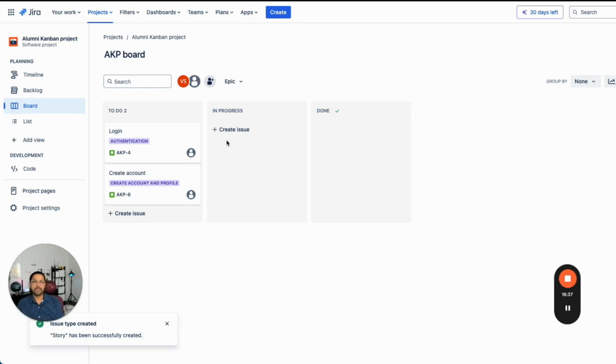We typically try to bring so much work and think that we can work simultaneously on many things, but in reality, if you pick something, you take it to the finish line, you get the momentum, you pick the second item, take it to the finish line, and you gain more momentum, unless something is in a blocked state. The point is, you don't want too many things in these columns.